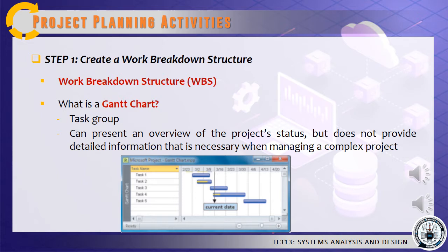Task 2 is only about 80% done and is running behind schedule. Task 3 should have started, but no work has been done. Task 4 actually is running ahead of schedule, and Task 5 will begin in several weeks.